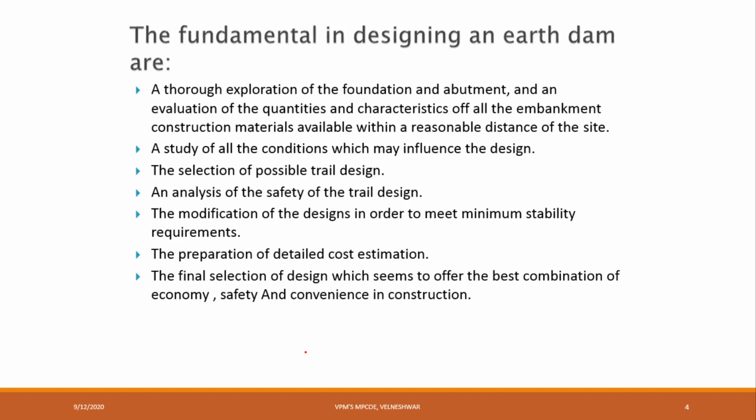Next, preparation of a detailed cost estimation. The main important thing here is the estimation. Based on the estimation only we can decide how much overall cost it is going to be, and whether that much amount is available with us or not. That is the most important, whether we can decrease it, because most of the chances here are in excavation, as we have to bring soil from one location to another. In this process transportation charges will increase, and generally for excavating we require some machines, for which we have to provide diesel. So we have to see all this, and based on that we make our cost estimation.